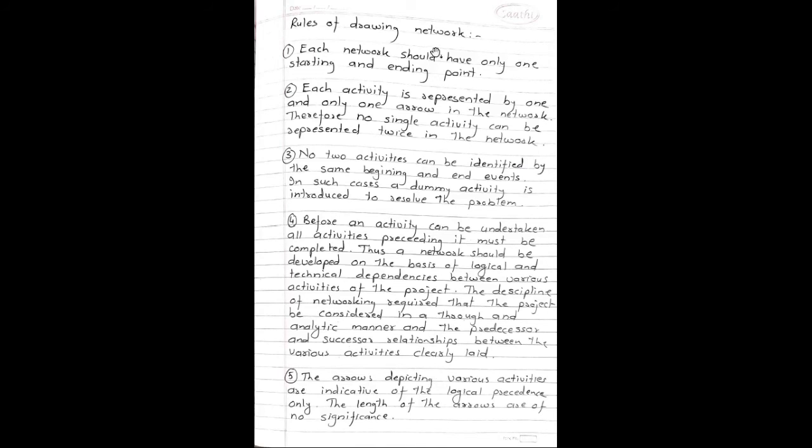Rules of drawing network. First rule: Each network should have only one starting and ending point. Second rule: Each activity is represented by one and only one arrow in the network. Therefore, no single activity can be represented twice in the network. Third rule: No two activities can be identified by the same beginning and end events. In such cases, a dummy activity is introduced to resolve the problem.